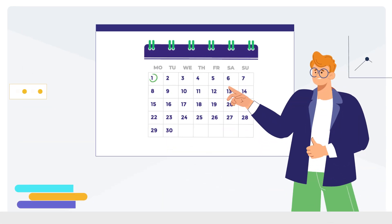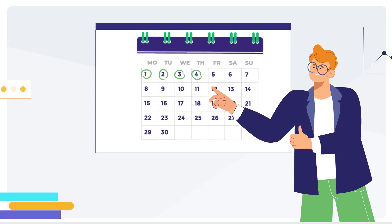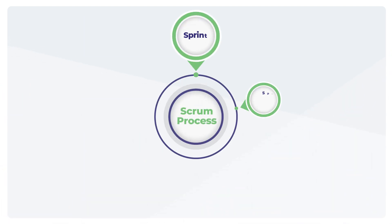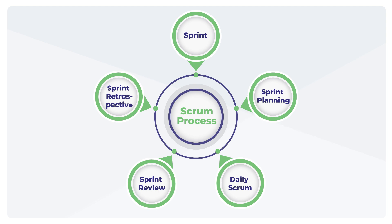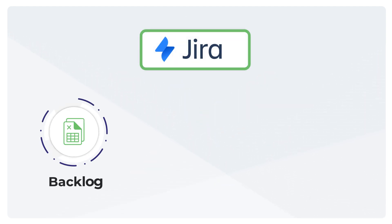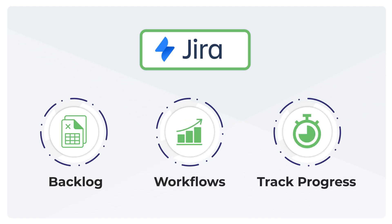Sprints are a set amount of work to be completed in a time-boxed period, usually one to four weeks. Sprints are central to the scrum process, allowing teams to make regular progress and adapt quickly. In JIRA, sprints help you visualize your backlog, move tasks through workflows, and track progress in real time.